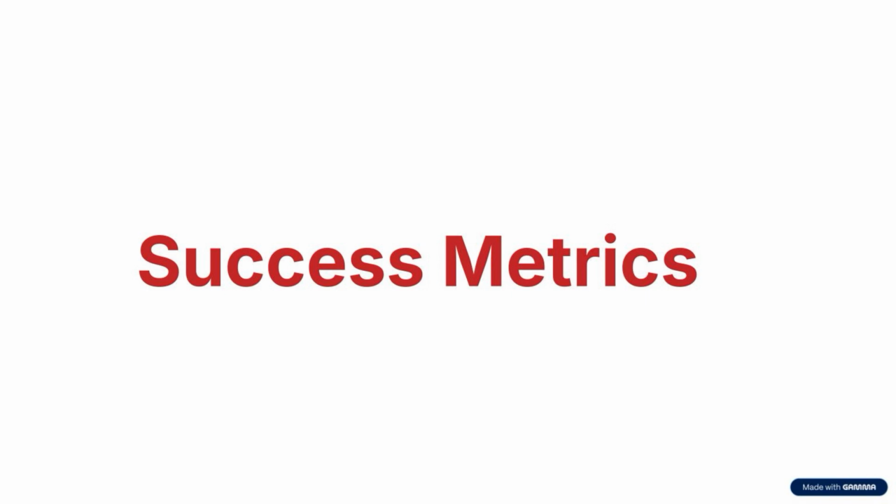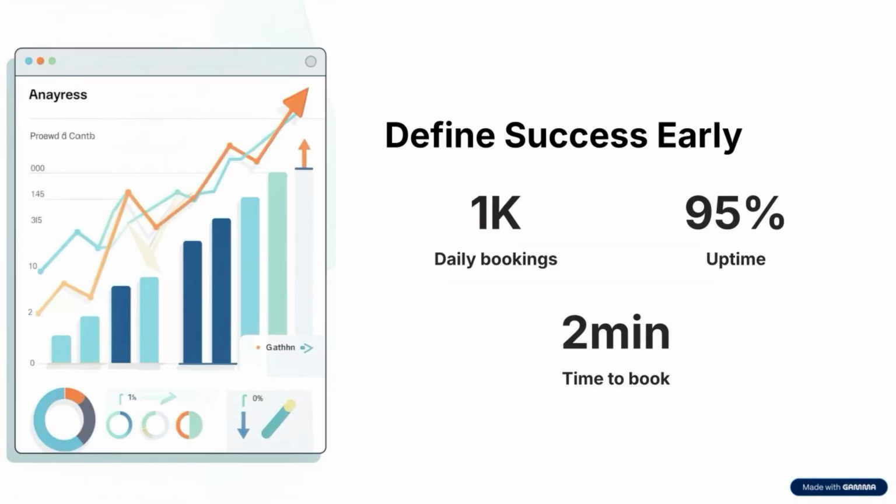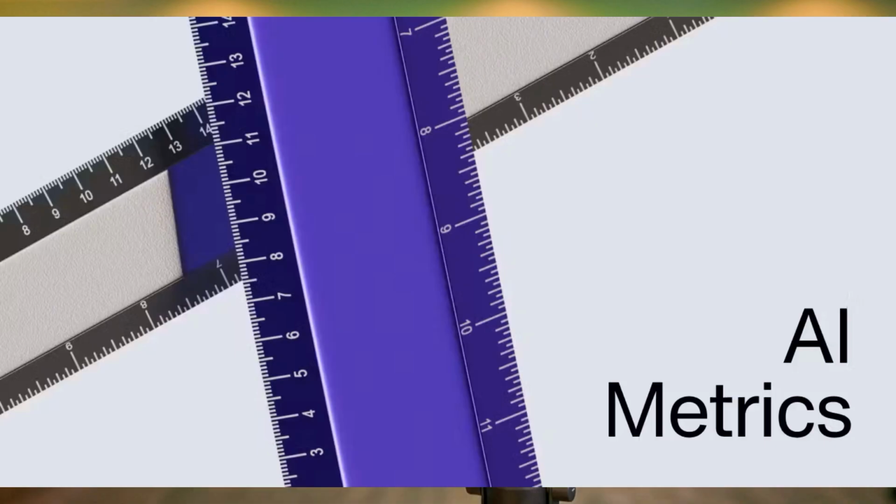Now comes the critical step. You need to identify the success criteria. How would you define success? For example, number of bookings, successful transactions, user adoption, or even low payment failures. Metrics often influence team behavior. If teams focus only on increasing the bookings, they will ignore the refunds, the downtimes, or even the user frustration. AI can help you by suggesting metrics and providing you with industry benchmarks. But meaningful metrics usually come from understanding the business deeply.